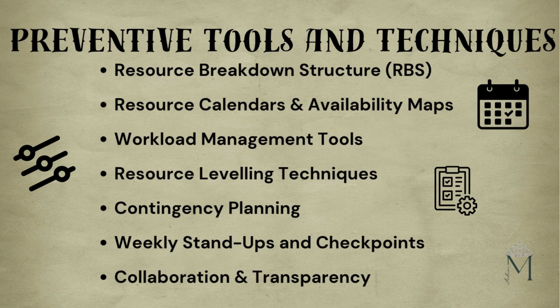Plan for backups in your risk register. For example, if a key developer might get reassigned, have a trained alternate ready or document onboarding plans. By doing so, it will keep the project moving even with sudden changes.